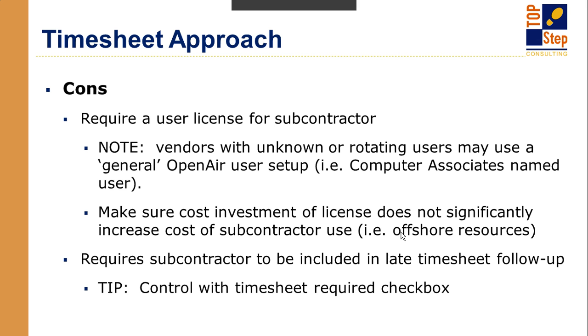Now, if you're going to combine these approaches, the first thing it says at the top of the screen is be careful, watch out. Anytime you combine any two of these approaches, you're at risk for double counting costs and/or revenue.